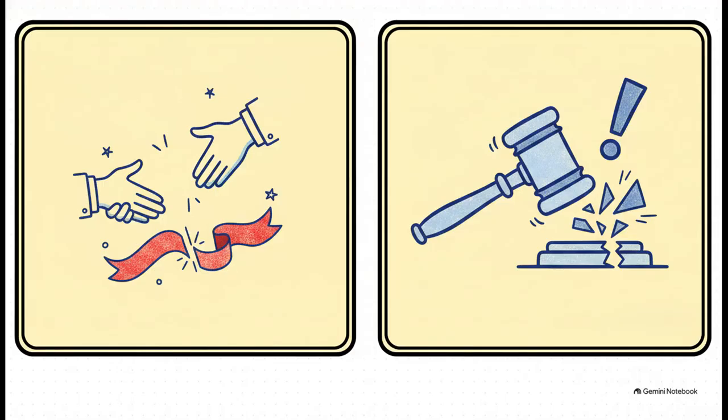We also need to talk about termination claims. The key thing to look at here is the trigger. Termination for convenience essentially means the contract is ended without one specific party necessarily being at fault. Maybe the project funding just dried up. But contrast that with termination for cause. That's when a specific, undeniable breach literally forces the cancellation of the contract.